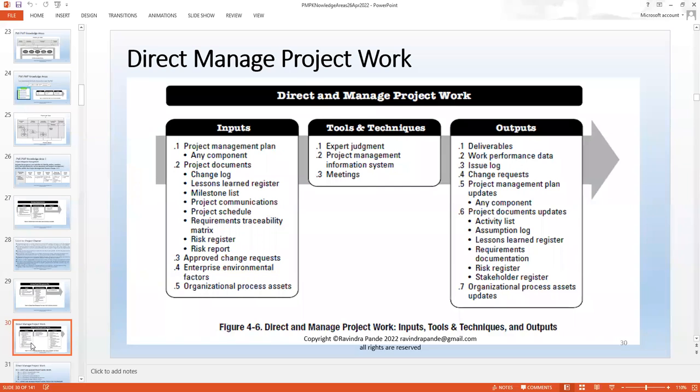Now let's understand this process. Let's say a client project manager comes in on our enhancing attendance management solution and tells you to also include the parking arrangement or the parking management for a given building. Now when this request comes, as a project manager, you normally don't have the time to understand what type of parking, how many offices, what type of cars, what type of trucks, and all those things. So what you do, you normally channel this requirement to the change control board.